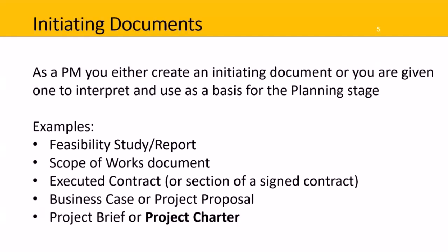Now, it's important to know that initiating documents have several names, but they all mean the same thing. And there's some examples here. So you may have heard of a feasibility study or a feasibility report, a scope of works document or a statement of work, executed contract or a section of a signed contract, maybe in an appendix or an attachment, a business case or project proposal, or maybe a project brief or a project charter. In this instance, I'm going to take us through a project charter, but just remember the information in the project charter is very similar to all of these other documents. They all are the same thing with different names.